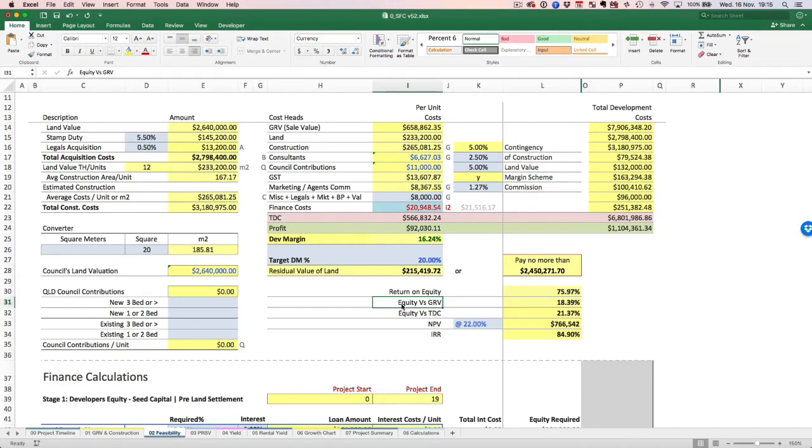So don't look at the sides. If you master running numbers on sites and reading out some basic due diligence stuff like the slope, or whether or not there's a tree, or whether or not the site's contaminated, or whether or not there's a height restriction or the setback, or all these things. They're very minor things, and I'm not an expert at all of this, but I've only learned it over the years, looking at different sites and saying what's wrong with this, and what can we do with this, or what can't we do with this, and spending money along the way with architects or town planners, and getting a report back only to find out that it doesn't work because it's got this kind of issue or that kind of issue.